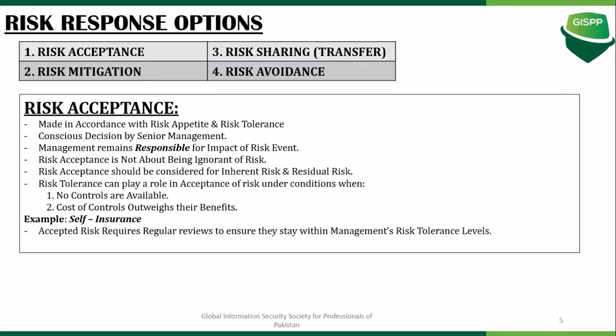Now, risk tolerance can play an important role in the acceptance of the risk itself, and this is usually important in two cases: when there are no controls available to mitigate the risk further, or when the cost of controls outweighs their benefits. And the example is self-insurance.